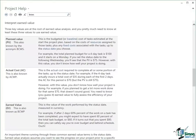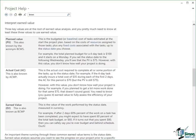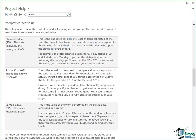One of the reasons for using the example in the online help here is that I believe there are a couple of errors and I really want to refer to one of those here. In the case of actual cost, what the actual cost represents is the actual cost of the work that we've done so far. In the example here they talk about the four day task again and they say, for example, if the four day task actually incurs a total cost of $35 during each of the first two days, the AC, the actual cost for the period is $70 but the PV is still $75. That's wrong. I think the PV should be $50 because in two days out of four you will have incurred $50 worth of cost.